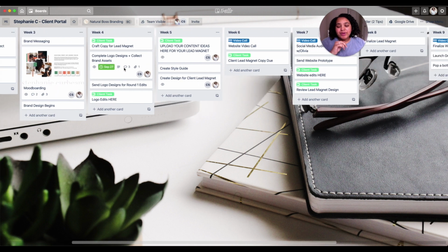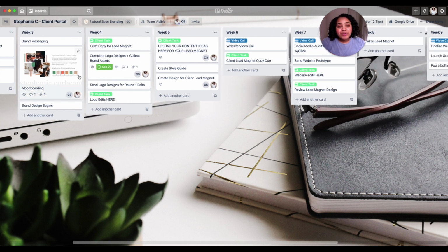Then week 3, we went into brand messaging, mood boarding, and that's when I start designing your brand. So I start looking for images of inspiration, and I send it to you for approvals, and then you approve it or you give me feedback, and we just kind of go back and forth for that week. And then that's when I start your logo as well. So we start your branding identity suite, and then by week 4, I'm sending you edits.